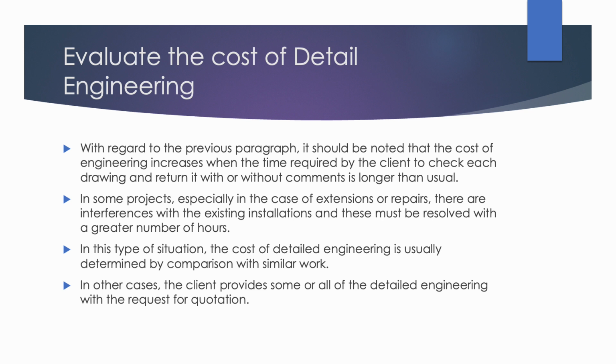Evaluate the cost of detail engineering. With regard to the previous paragraph, it should be noted that the cost of engineering increases when the time required by the client to check each drawing and return it with or without comments is longer than usual. In some projects, especially in the case of extensions or repairs, there are interferences with the existing installations, and these must be resolved with a greater number of hours. In this type of situation, the cost of detailed engineering is usually determined by comparison with similar work. In other cases, the client provides some or all of the detailed engineering with the request for quotation.